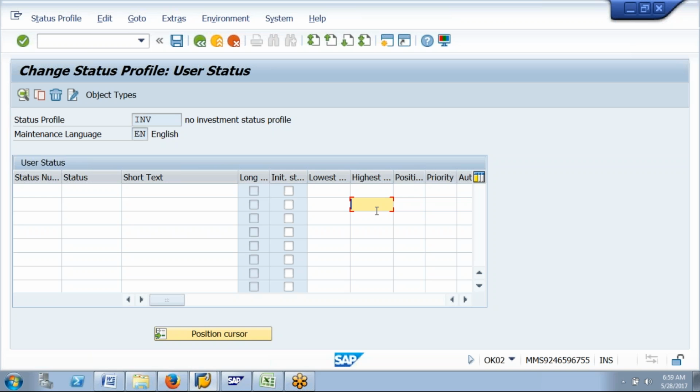So like this, different numbers we can maintain here. It depends on the status. Here I am maintaining some numbers, after that you will come to know. Assume status 1 is project created. So we are creating a different status here. With the project created, which status you want to display? You can give anything, a 4-digit character ID which may be numeric or alphanumeric. We are giving some PC or E. Give the description.